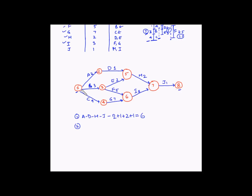From node three we have two paths. Taking activity E first, the second path is B-E-H-J, with durations 3 plus 2 plus 2 plus 1, which equals 8 days.